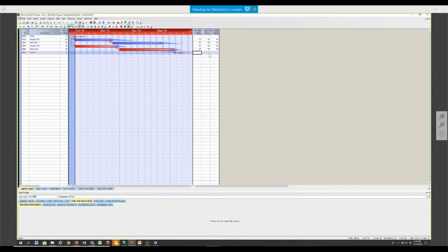That's not that uncommon, because as project people, we're so good at managing the critical path that often it no longer becomes the critical path. It's like the whack-a-mole game at the Stampede grounds. If you've ever played that, the mole pops up and you hit it with a mallet, and it goes down, another one pops up and you hit it with a mallet. And we do that with critical paths. We do such a good job of whacking down the critical path that another critical path pops up. And that just keeps happening. Then we're surprised that we have all these new critical paths every time we do a schedule update. So this can help us identify where our likely critical path is going to be.